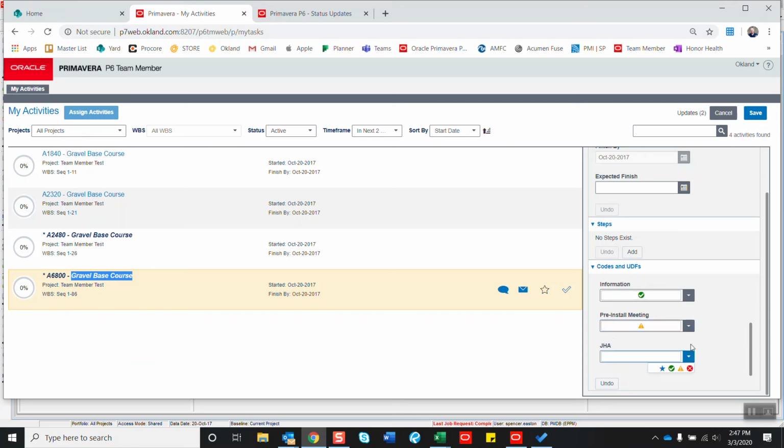Okay. And part of that, we need to make sure that you're starting to fill out your JHA so that you understand the problems even before you get on site and we start work. That shouldn't be like a pencil whipped thing right before we start. So let's put that for talking about during our pre-install meeting. As we start to plan those things out, that will make the work ready. So when we come up to the time frame of actual execution, we just go to work. Everything's already lined out. It's looking far enough ahead and making that ready so when the time comes, boom, we can execute.